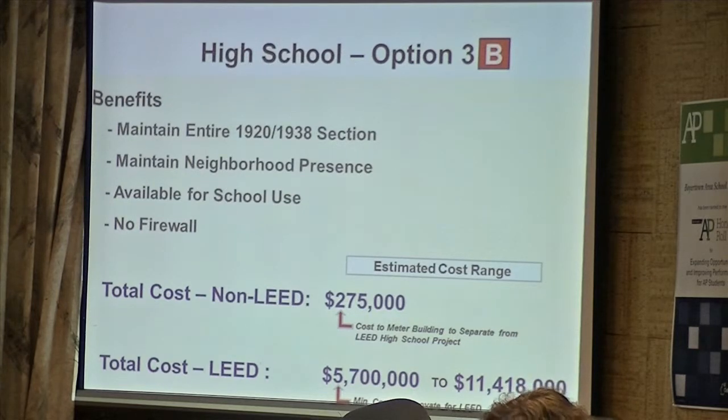The alternative, if you're after the bid goes out, would be a change notice, right? A change order, yes. And they're more expensive. Oh, yeah. Or you bid it as a supplemental contract and you could get other bidders on the project. Now you could have another set of contractors. More than likely, the people that are on site would be more competitive because they're already mobilized on their own site, but you could bid it as a separate contract.